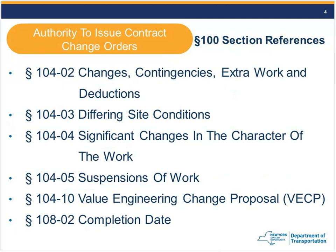Who has the authority to issue change orders? The department as a whole has that authority. When looking at the 100th section, the engineer is generally the one acting, but they act on behalf of the department. The relevant subsections are found in Section 104: 104-02 covers changes, contingencies, extra work, and deductions.